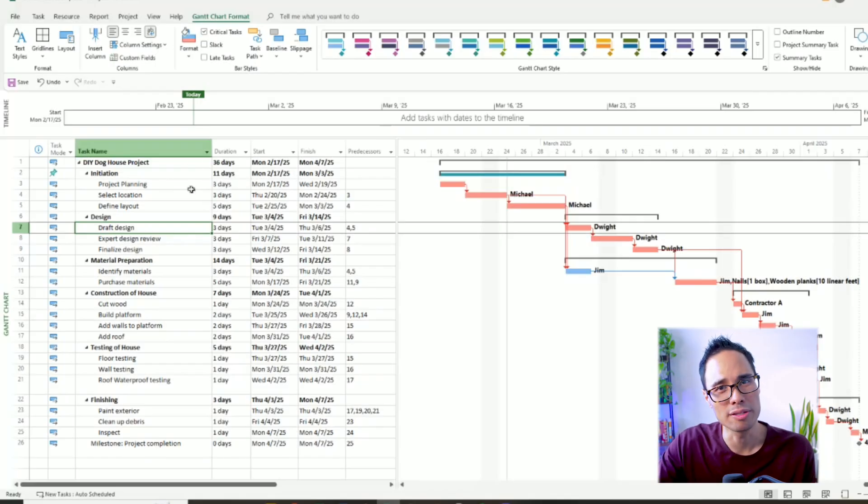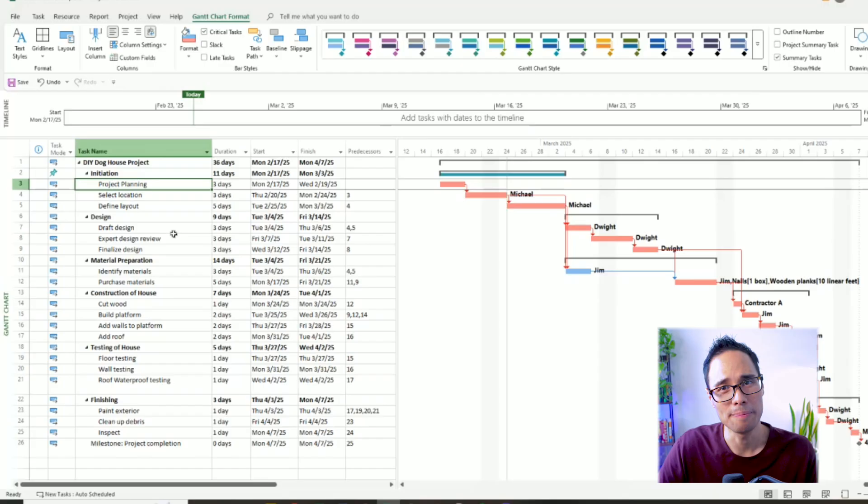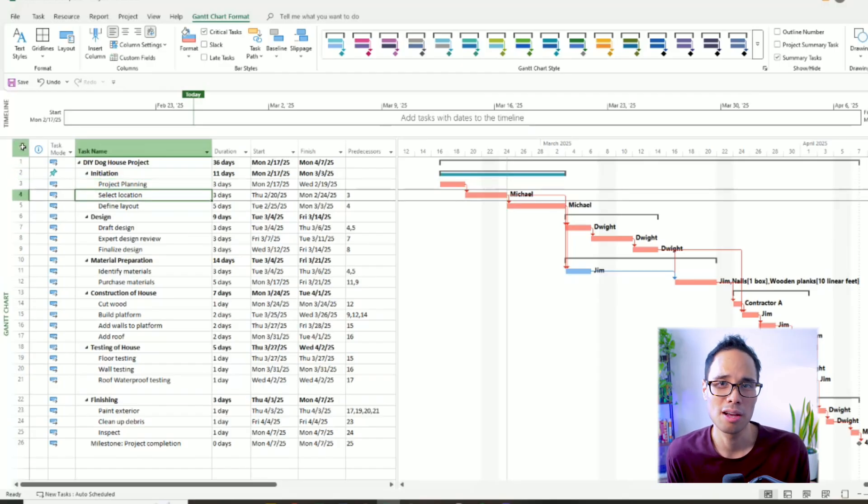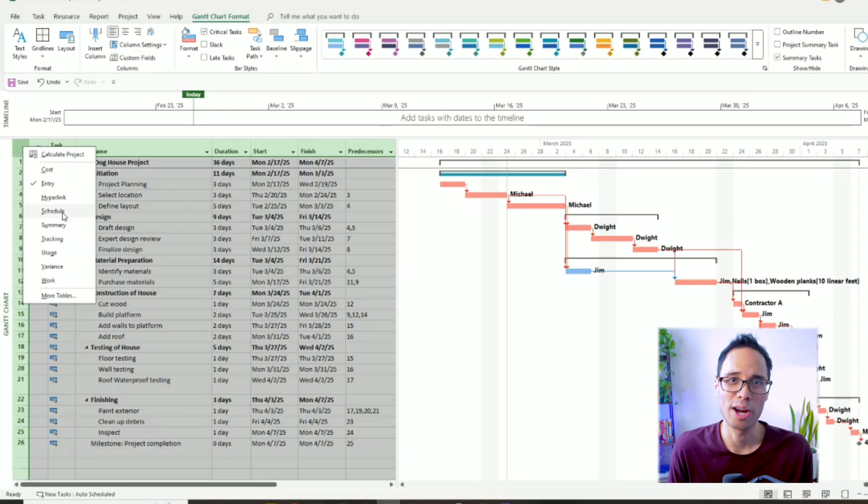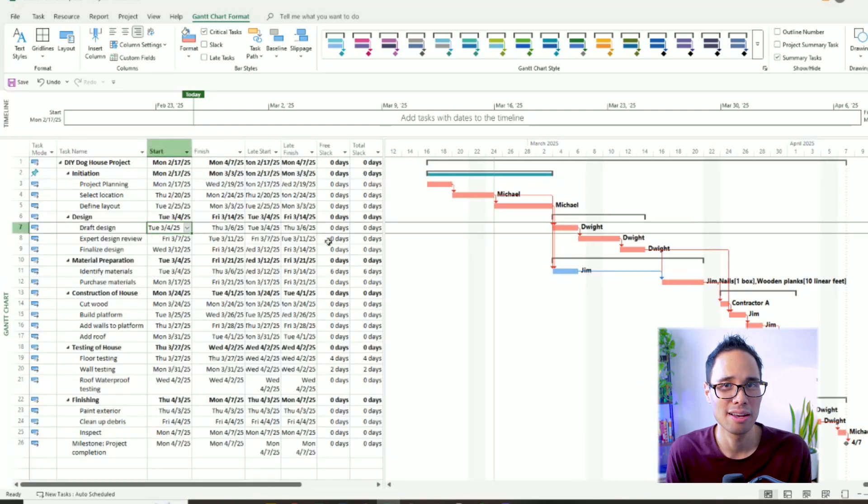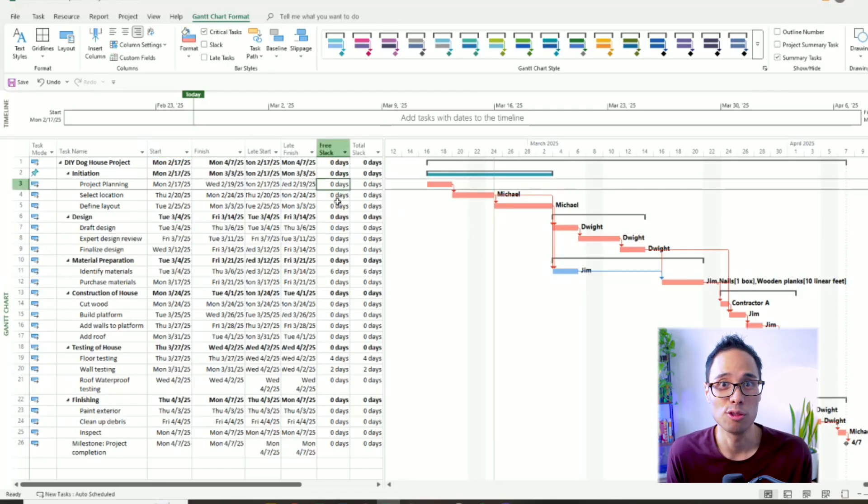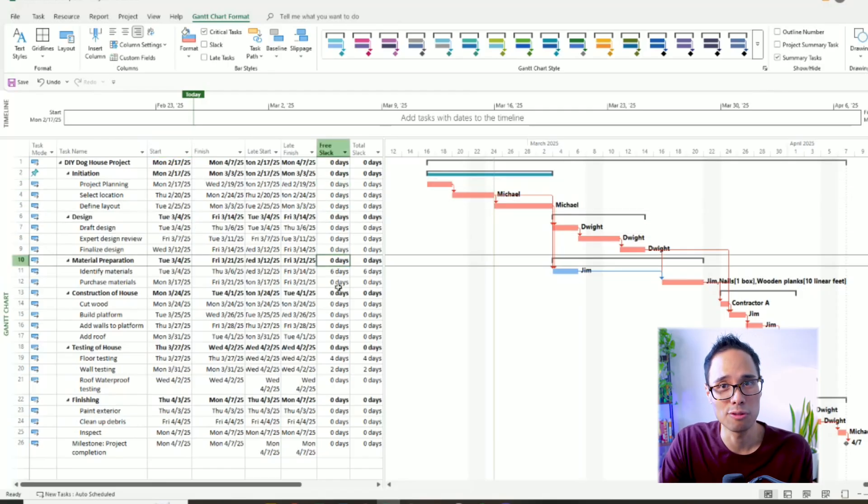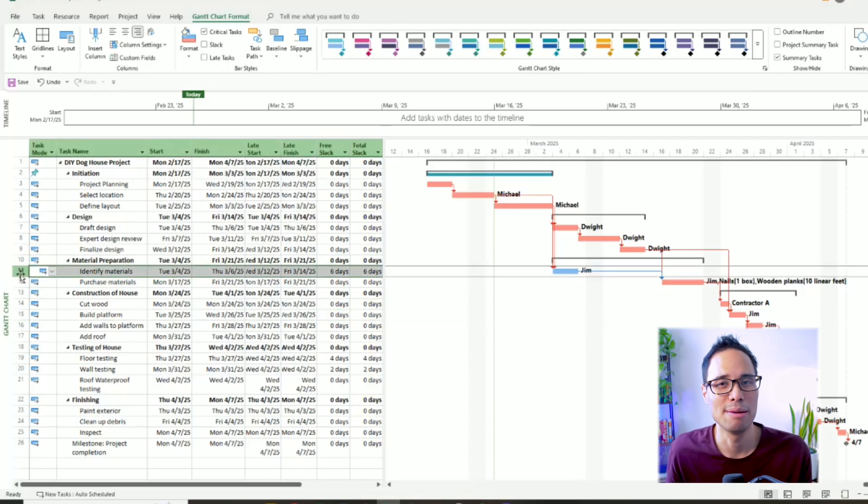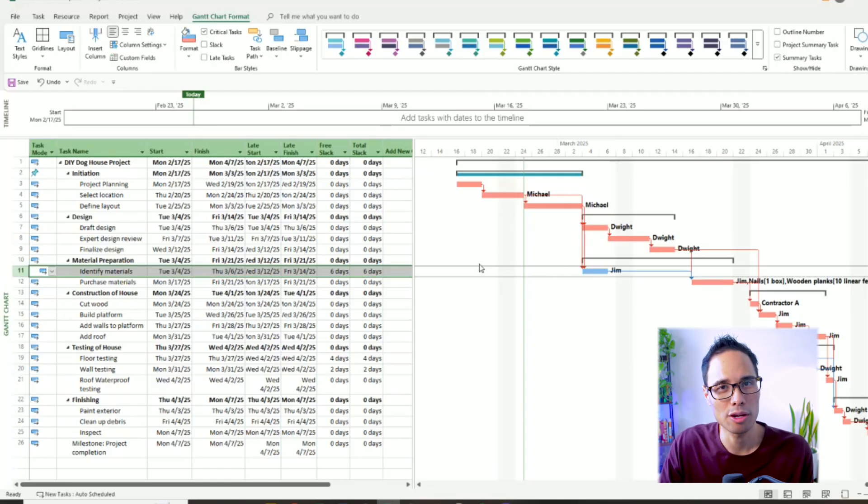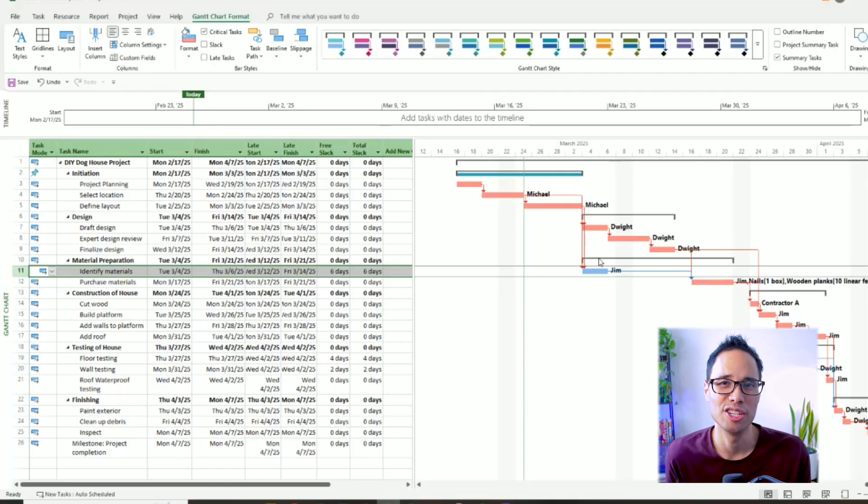To visualize how much Slack each of our tasks have, let's switch our modes from Entry Mode to Schedule View Mode. Move your mouse to the top left box in the corner, right-click, and choose the option for Schedule. Right away, we see that most of the tasks in our project are on the critical path because they have zero total float. If you look at the values on the column for total Slack, the task for Identify Materials has a total float of six days before it goes on the critical path, which is very helpful information to know.